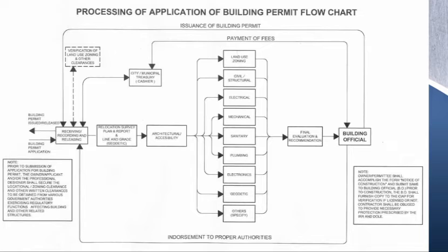And for this example is kailangan nilang humingi ng clearances or ng permit from the DENR or the Department of Environment and Natural Resources. And the next step is the relocation survey plan and report and line and grade, and this will be supervised by a geodetic engineer.